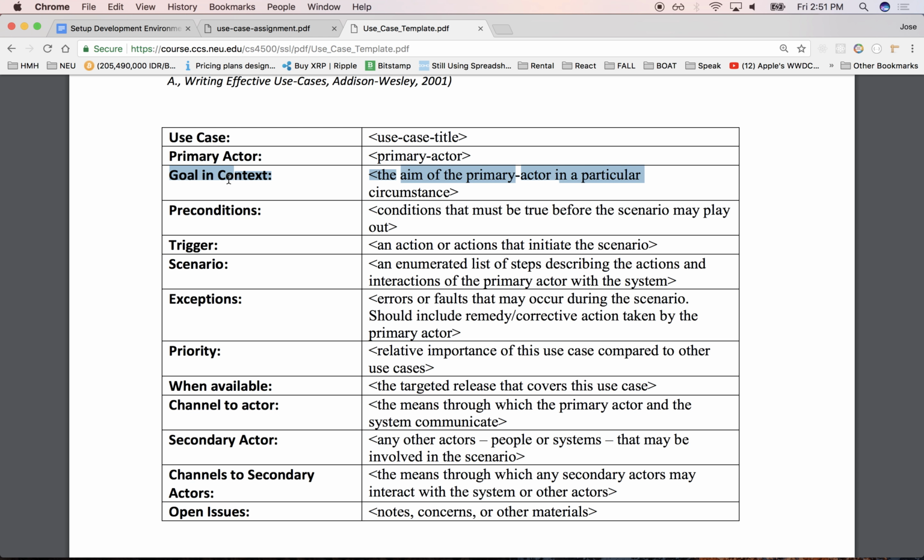Priority. All right. So presumably there's been a discussion with your stakeholders on the priority of this use case, right? Typically, all these use cases will be documented as well as in some backlog. One use case might be represented as 4, 5, 10, 20 different stories, right? In Jira or one of these tracking tools, right? On how you're going to implement this, right? And so it'll be represented in some backlog of things that need to be done, right?